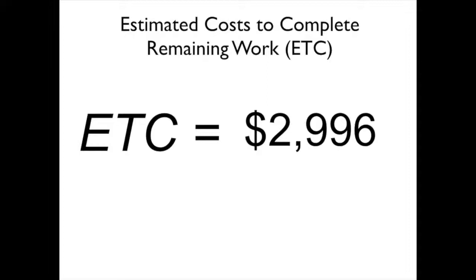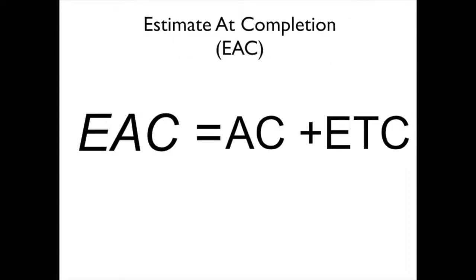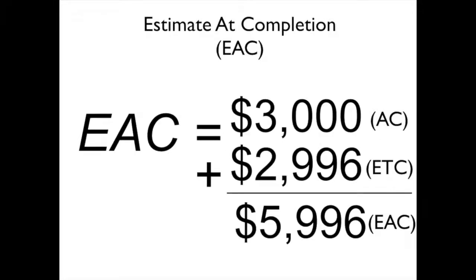Now we can take that value and add it to our current actual costs, and we can get our estimate at completion, or EAC. This is what the project will cost when it gets done. So in this case, we take our $3,000 of AC, add it to our ETC that we just calculated, and we get an estimated at completion of $5,996.